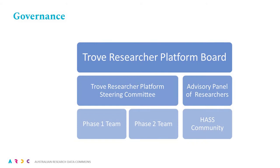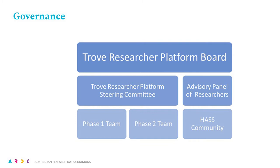The Trove Researcher Platform Board will have oversight of the project and will be responsible for ensuring the project meets the objectives set out in the project management plan. The board will meet quarterly. The Trove Researcher Platform Steering Committee will ensure the two teams leading the consultation and build phases of the project are delivering against the milestones, as well as providing advice and expertise. The committee will meet monthly or more frequently if required. The advisory panel of researchers will oversee the consultation phase and will be a welcome resource throughout, providing feedback and comment as the project proceeds. This panel, with ARDC assistance, will be consulting with the HASS community to validate the outcomes of the consultation phase.